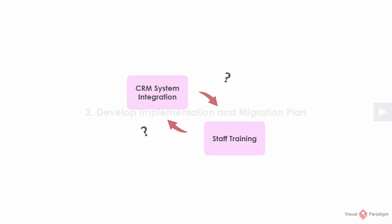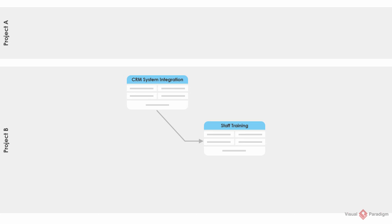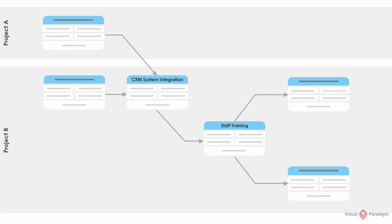Activity 2: Develop implementation and migration plan. This activity focuses on the scheduling and sequencing of work. It involves determining the dependencies among work packages and creating a schedule for implementation activities. In order to represent the dependencies among work packages, form a PERT chart with the work packages and establish connectivity between tasks. Tasks are the alternative form of work packages. A PERT chart stands for Program Evaluation Review Technique, which helps you create diagram workflows, milestones, schedules, timetables, critical paths, and other planning requirements for a project. The connections between tasks represent their dependencies.